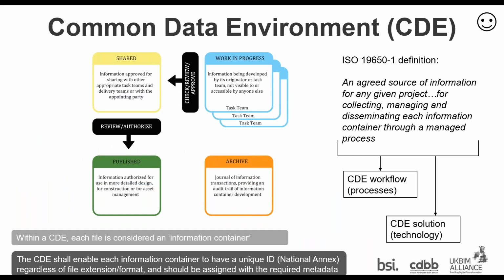And then touching on the common data environment. Again, many of you will be aware of these. But I think the nice thing that it brings home in the 19650 world, and certainly the guidance, is that there's often a misconception when people talk about a CDE, they automatically think of a technology, a solution. But fundamentally, the CDE is, more than anything, a workflow and a process. But it is also a solution, a technology that may make up that process. There's never one solution that fulfills a CDE, or if there is, it's very, very uncommon. There are multiple different platforms from different people and organizations involved on the project that would put in the solutions to fulfill the overall CDE workflow and process.